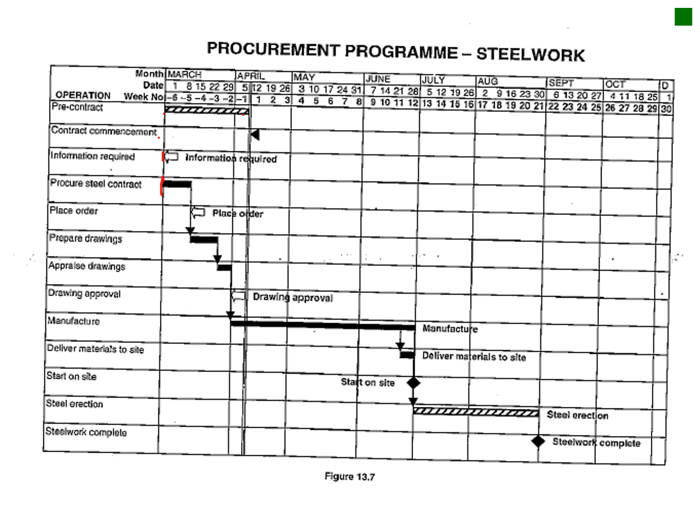So then you sign your contract with your supplier, then you place your order. There's the quotation period from the suppliers, subcontractors, etc. Then you place your order over here, and then you prepare your shop drawings, usually appraise the drawings, and then drawing approval, so it's approved, and your materials ordered.